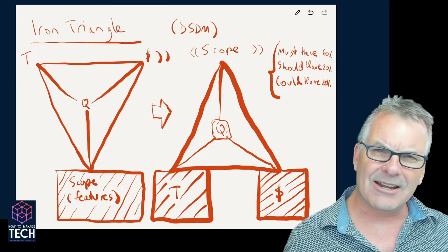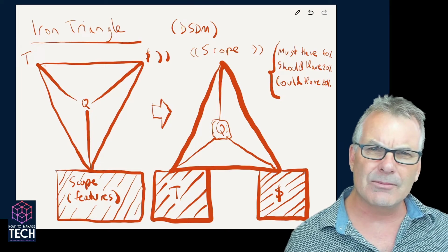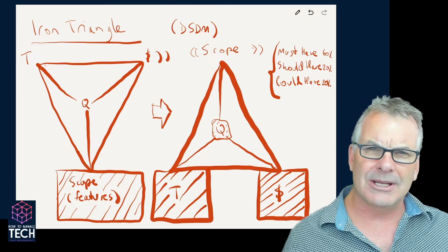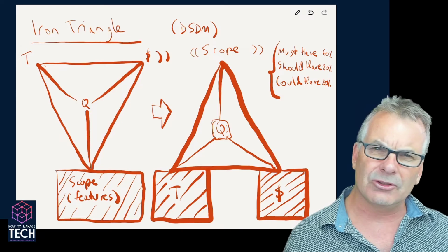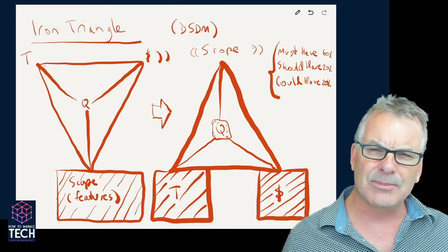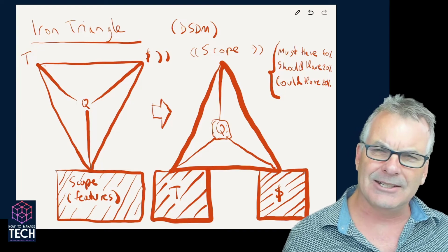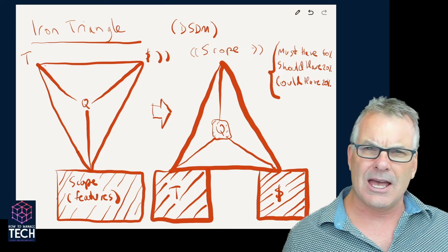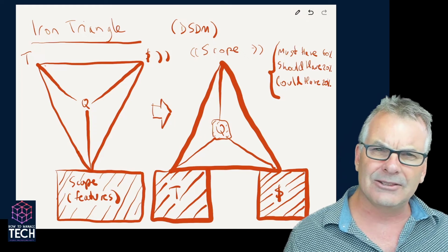Now, best case scenario, you get all the musts, all the shoulds, and even most of your coulds, so about 100%. But let's manage our user and sponsor expectations to say on time, on budget, on quality, you'll get about 80% is a reasonable expected case. Everything goes smoothly up to 100%. If things go pretty badly, 60%.